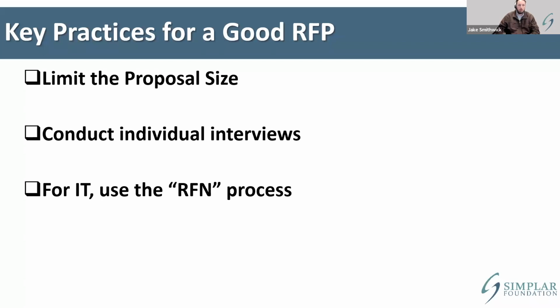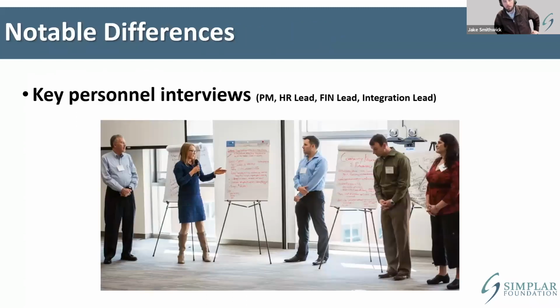The next thing we recommend here is to conduct individual interviews. Many times what we see on procurements, especially in this space, is to have what are called team interviews. So this is an example of that, where you have the whole team coming in here. And what we find here is that certain people lead the conversation, right? And when you have these people that are leading the conversation, that can make things uncomfortable, or we don't actually understand what each person's value is to the project. And because of that, maybe just the well-spoken marketing person or whoever is doing all the talking. And really, if this is your on-site person, that's who you want to talk with, right? You want to hear what their thoughts are in an individual setting, not as a team interview.